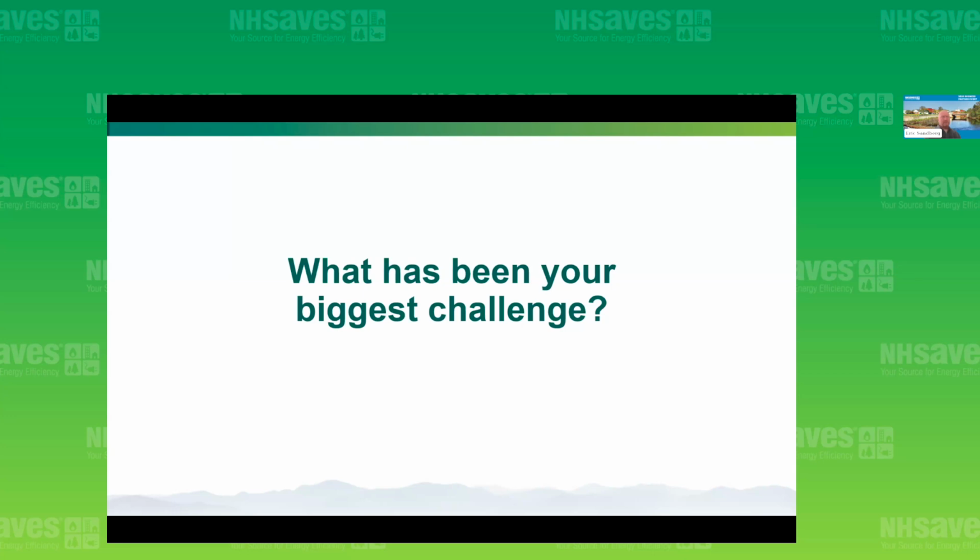Yeah. And I think probably our biggest challenge, and rightly so, if there's going to be a six-figure incentive put against a project, is that there's a time component to making sure that all the savings and the methodologies have been documented, and that sometimes there's some urgency with equipment that's failed and needs to be replaced right away. So our biggest challenge is the urgency to get new equipment in as quickly as possible, especially if there's a rental compressor, and then the timeline to make sure that we've got the engineering approvals. But over time, in the 20+ years, that time has been greatly reduced, and it's our biggest challenge, but one that's year by year getting better and easier.